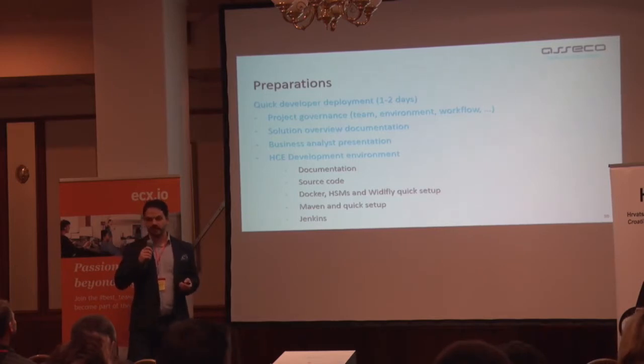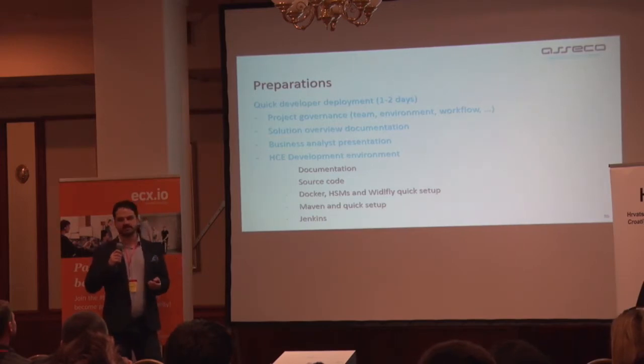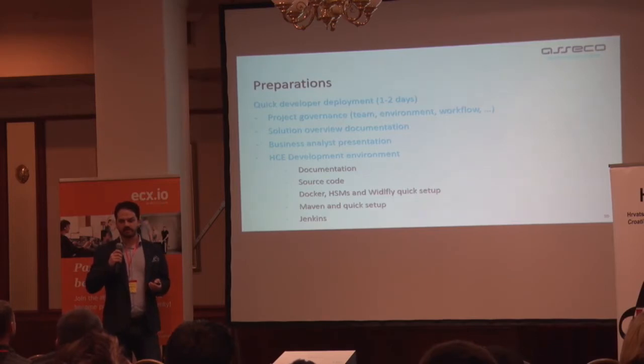Because you all know, in a project of 1 year, you're going to lose some of the employees, some are going to arrive, there's going to be fluctuations. But using this, I'm happy to say that within 1 week, a senior developer is fully operational. He can work immediately. In 1 day, the business analyst describes to him all this mess of the MasterCard specification. Second day, he can read all these documents. And the third day, we wrote down on the Confluence page everything that the developer needs to have to start.